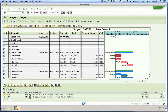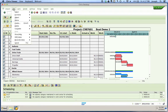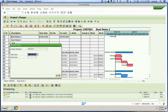To maintain actual dates on your project, you need to change the dates you originally set up. The goal is to reschedule the project so that activities are completed one week prior to the current date. We'll begin by shifting dates on the project. Select all, then go to Edit, Shift Dates. This will change all dates for the project — since when we originally built it, we started it two months out, but we need to confirm an activity that happened last week. We'll change them to one week prior to your current date.